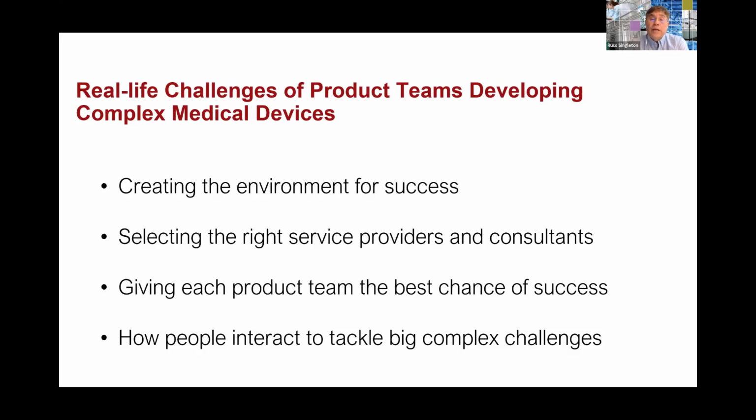The second part is what Aaron had in his slides, which is getting the science out of the engineering. Don't try to tackle things that you don't understand. If you've done the science work, then great, you can start the project. But if you haven't, don't try to do the science work in the middle of the development, because you're going to run into problems and have to do it over and over again.